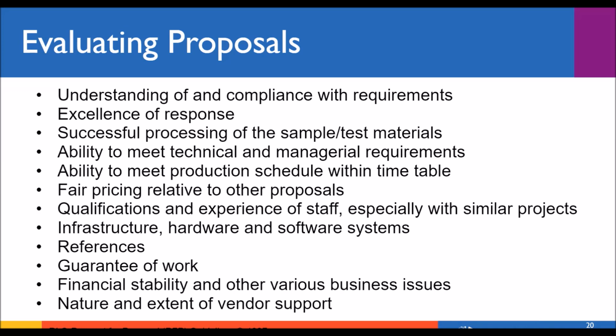Now, as you go through and you're evaluating your proposals on this information, make sure that you document your evaluation for each proposal so that you have that documentation to support your ultimate selection, both to your procurement office and possibly to unsuccessful bidders.